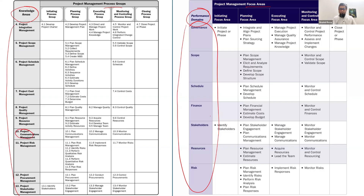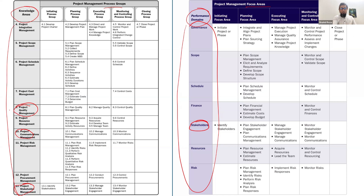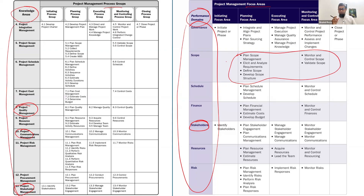Communication is not a separate domain here; instead, communication and stakeholder are merged into the stakeholder performance domain. There is no quality knowledge area — it has been removed because PMI considers quality to be an attribute of scope. Quality is now integrated with scope, especially the control quality and plan quality processes. Also, there is no procurement knowledge area or performance domain. Procurement is in a separate appendix in the 8th edition — Appendix X4 — where you will find the details of procurement.